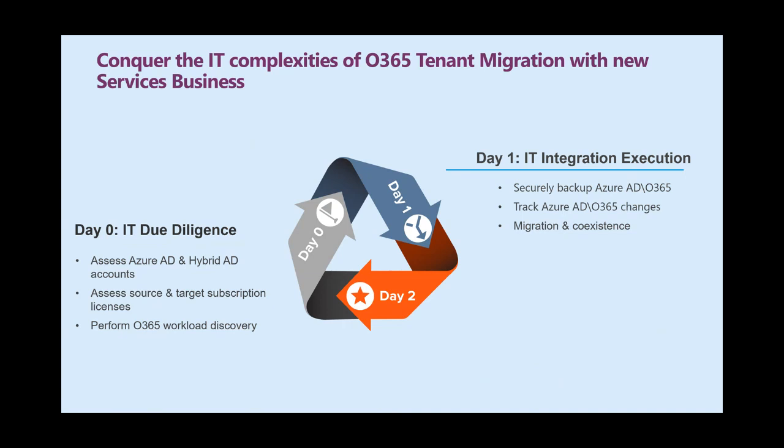Day 1, it's the integration, and before you run any kind of migration job, do a backup. It's very important. Track all the changes, and run the pre-migration tools to see in a kind of dry run if something could go wrong when you would kick off the migration. So dry runs, and a lot of good tools provide dry runs. Then you see which things are going to be part of your mitigation list, and where you have to spend a few more hours to fix them before you can kick the start button on a migration tool.